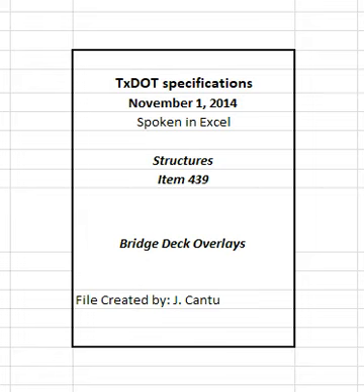4.5 Curing. Apply wet burlap to cure the overlay as soon as possible after the concrete has been textured. Overlay that dries out or cracks before the wet burlap is applied will be rejected. Keep the burlap continuously wet for 48 hours for LMC and for 4 days for county overlays. Allow LMC overlay to air cure for an additional 48 hours before opening to traffic. Water cure the co-overlay in accordance with section 422.4.8, final curing, for an additional 4 days.